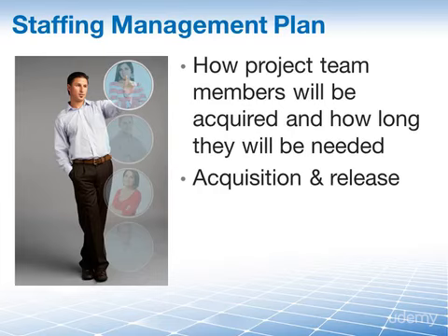And then under acquisition and release, we're going to say, this engineer that we hired in part 1 of this here that we need for 6 months, he needs to come on in January and leave again in July of next year. So that's the slight difference there, the how and the overall definition versus when exactly is this going to happen. Okay, enough of that.